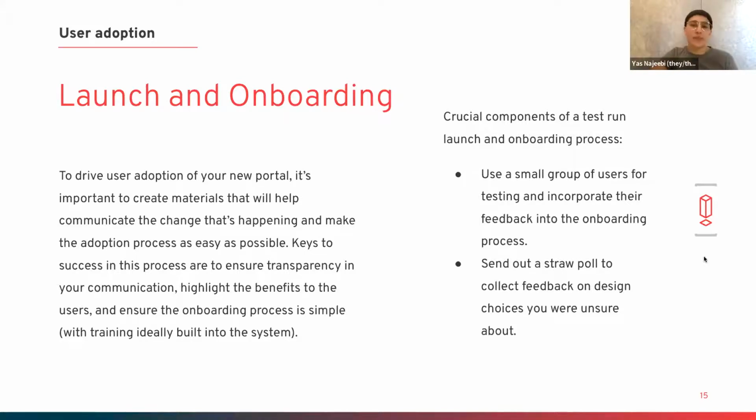Something that you may want to consider is using a small group of users and doing a test run where you onboard them and then incorporate their feedback into your onboarding process. So just sort of doing a demo. Doing this with a small group of users, maybe a set of constituents that you have a really close relationship with, it can generate positive feedback that you can then incorporate into your launch communications. In other words, it's a good way to get testimonials. And also their input may influence other changes that you make to your launch communications or to your onboarding process. You may think that your 20-step email instructions are very easy to follow and everyone inside your organization agrees. And then you do a test run and you find out that that is actually not the case to the average bear.